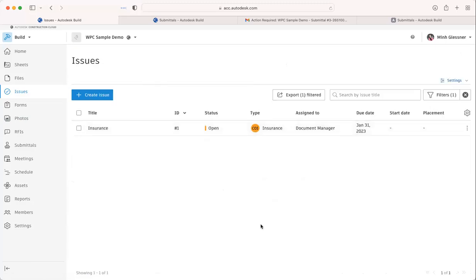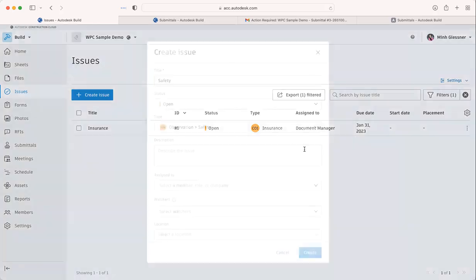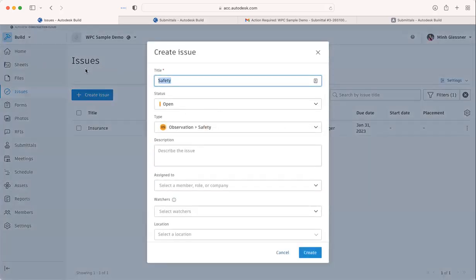From here, users such as project admins have the ability to add different issues with the title insurance and track this information. So for example, let's say I've just signed on a group of framers as my subcontractor, and they had submitted their insurance certification to me. And this is how I'm going to create this issue here. Framer. Actually, COI.